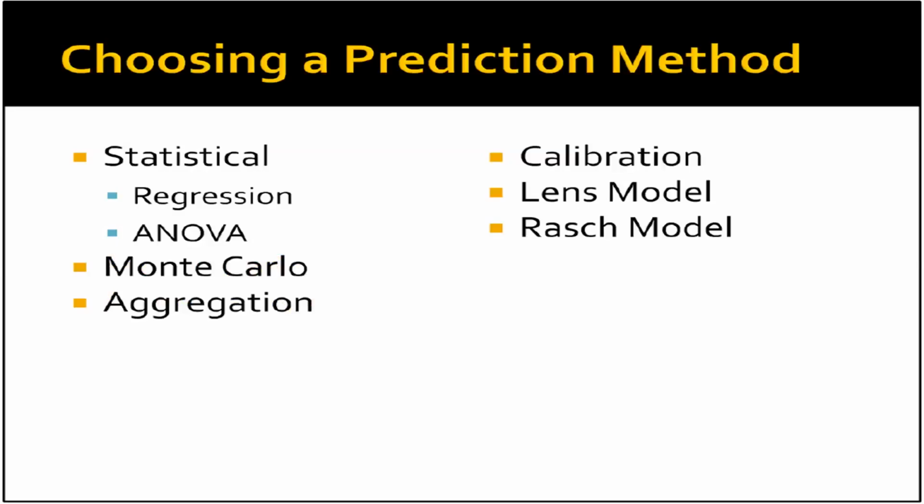In choosing a prediction model to use for tracking project success, you want to make sure that you are aligning the model with the type and amount of data you are planning to collect. If you're looking to determine if a project's outcome variables and measures have an effect on something, or an interaction with other variables, you might choose regression analysis. Regression can be useful in situations where you have several variables that you are interested in tracking simultaneously. Remember, regression can be adapted to predict binary outcomes, time series, or survival rates.